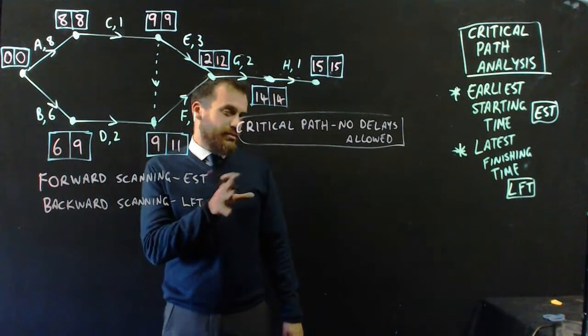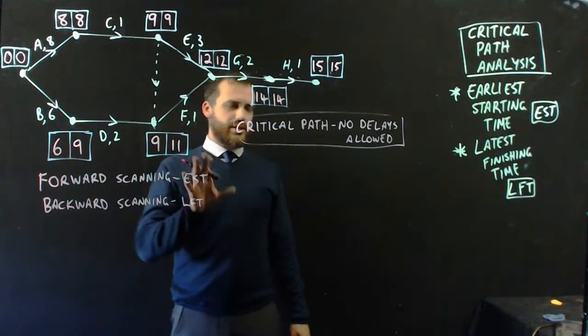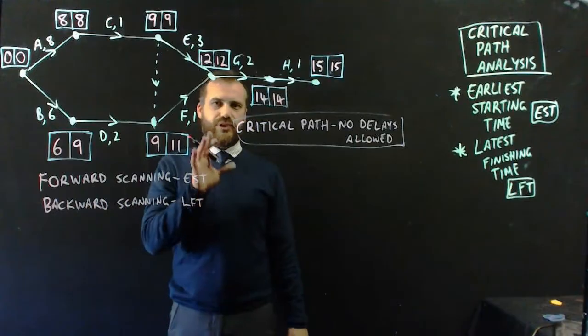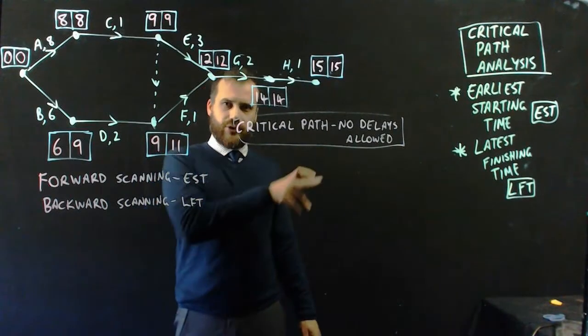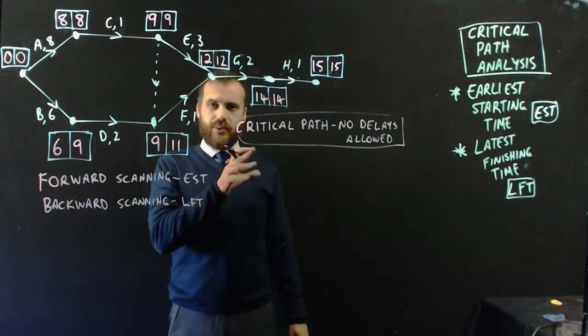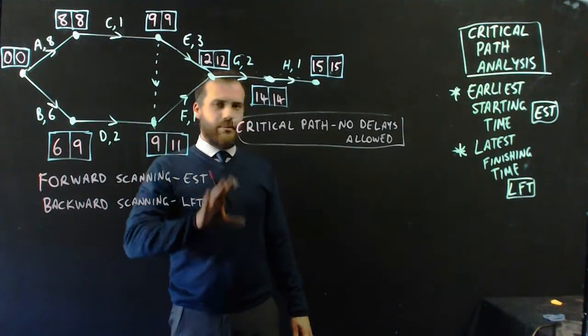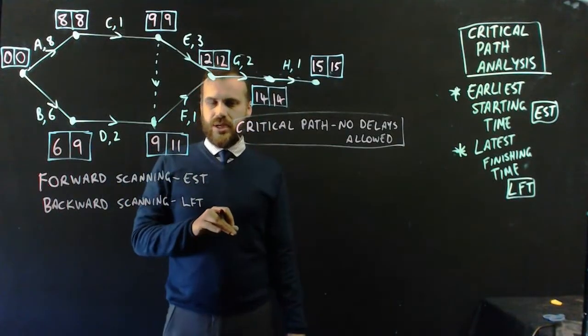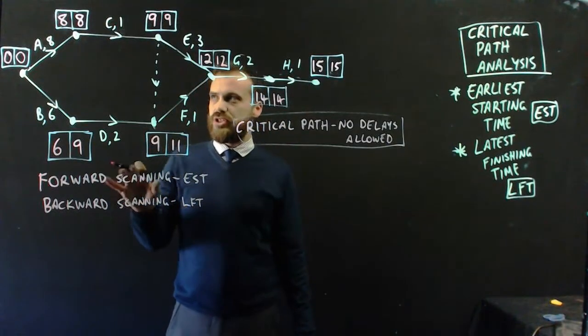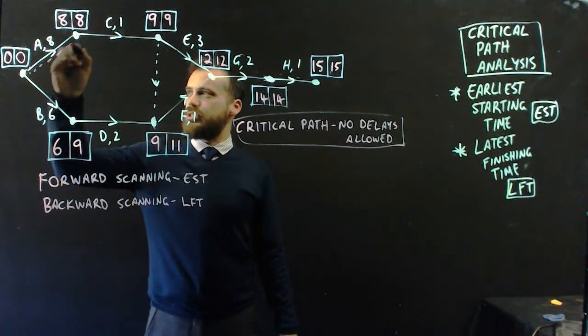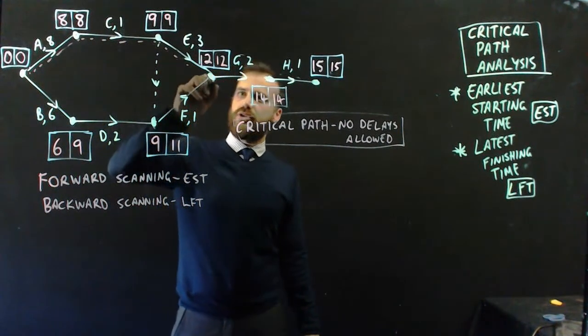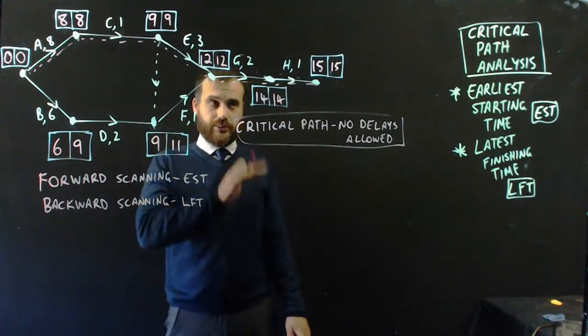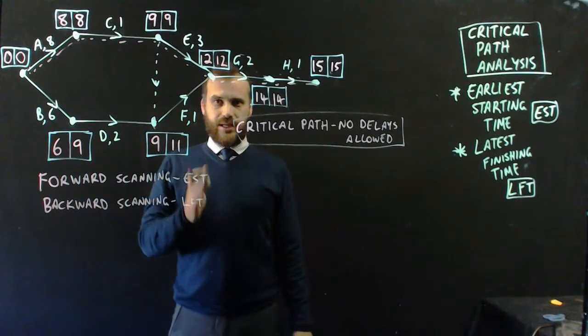So we're getting to the 10-minute mark now, and this is where I'm going to wrap it up. There is a nice, neat little table that I am going to draw up that sort of labels float times and things like that, but I'll save that for part two, where we can talk about that a little bit more. But I think we've done a pretty good job here. We did some forward scanning to find the earliest starting times. We did some backward scanning to find the latest finishing times, and most importantly, we found the critical path where everybody must work at maximum capacity, or the project will be delayed. That's it.